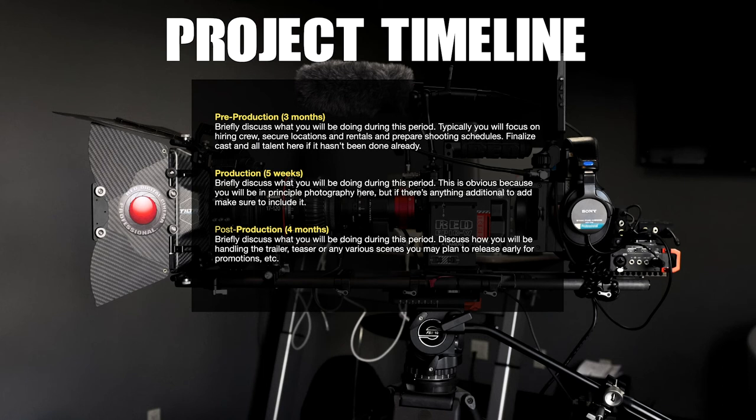Your project timeline slide should be brief and to the point — covering pre-production, principal production, and post-production, what's going to be taken care of in each period and how long it'll take. You'll probably want a separate, more detailed sheet not included in the pitch deck. This slide is the bird's eye view, and if they want more detail, have that available upon request.